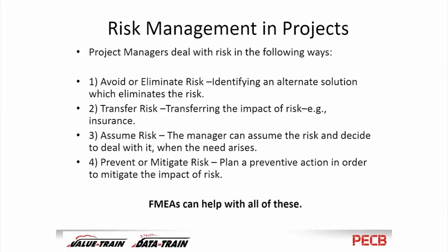You can eliminate it, and the FMEA approach is aimed at eliminating or reducing risk. You can transfer it, and I find that a humorous thing too. We'll give it to somebody else. Let John have the risk. But in their case, this means buy insurance. We can assume the risk. So I say, well, it's okay. We know that it's risky, but we're just going to deal with it. We're going to just take it.